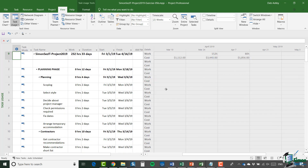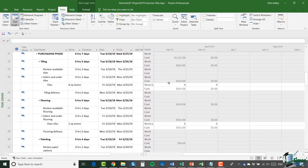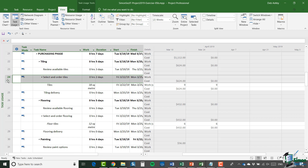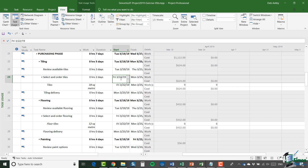Now if I show Cost with the current timescale enabled, I can see the cost of each of the tasks and where relevant each of the resources. For example, looking at task 24 — Select and Order Tiles — although I'm not charging my time to the project for this, the cost of the tiles is chargeable. Because the accrual is specified as at the start, and Select and Order Tiles starts on a Friday, the cost of the tiles — $18 per square meter, $624 — is chargeable to my project on that Friday. That's the same day the floor tiles are chargeable as well, which is a charge of $432.